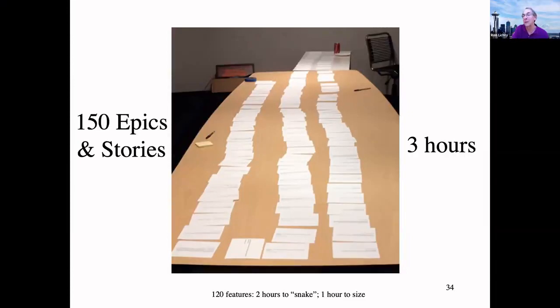If we get to the point at which we've got agreement, I put it down and I hand the deck to the next person, and the third person reads the third story and says, I think this is going to take less time or more time, or it goes in between the two that are already on the table. And 2 hours later, we've got this something that's a snake.